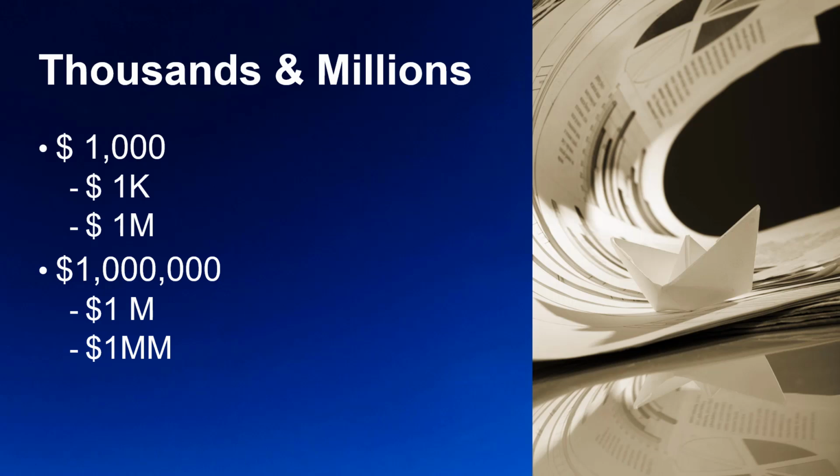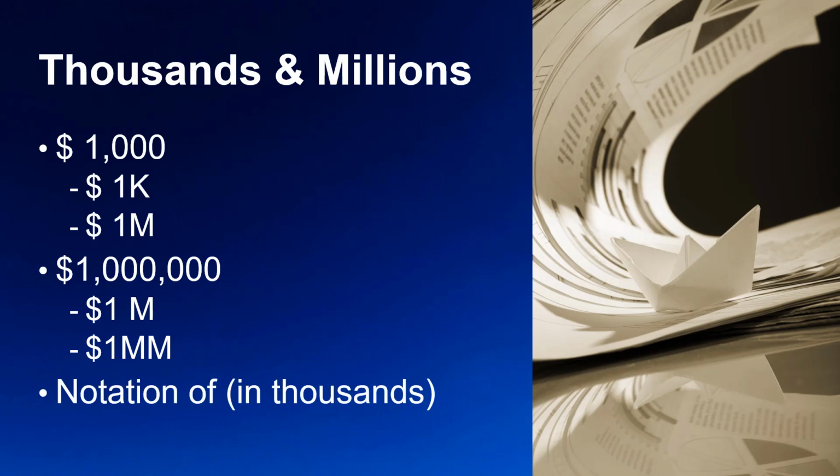And then lastly, you also need to look for notations in the report headers or footers for statements, like the numbers are in thousands or the numbers are in millions, to tell you the magnitude of the numbers. If you're used to working on projects and you see a number like 35,000 euros, make sure that it means 35,000. That there is not a footnote saying it's in thousands, meaning that the number is not actually 35,000, but it's 3 more zeros. It's 35 million. That can really mess up your budget. It might feel a little overwhelming until you get used to all these various notations.